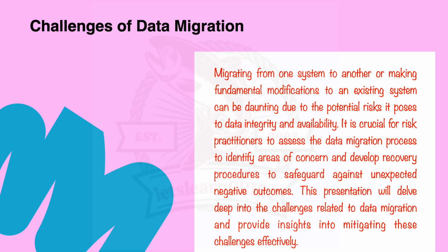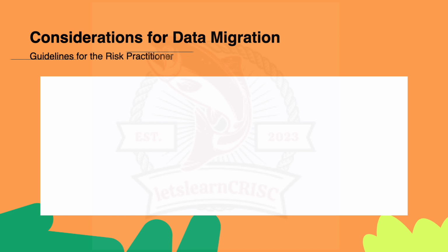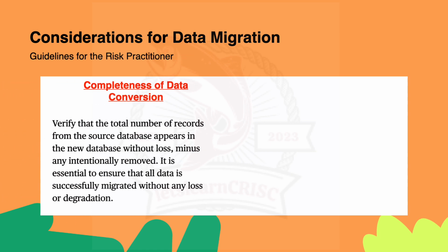Right? Moving next, we'll discuss the considerations for data migration. That is, first, the completeness of the data conversion. Friends, verify that the total number of records from the source data appear in the new database without loss, except for intentional removals, right? It is like ensuring that all your books are moved when shifting houses. Nothing is missing and intentional removals are documented. So for the risk practitioner, this means confirming that each piece of data is successfully migrated without any loss or degradation,